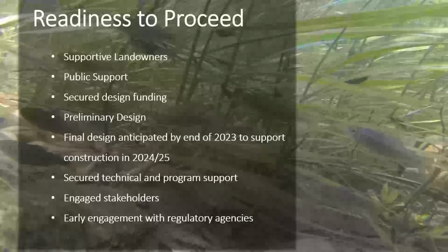And we'll move forward to 60% with concurrence from BPA and RCO. This presentation included a sneak peek looking at the 30% plan overview, which is 100% in line with the concept design that we included in this application. As I mentioned at the beginning of the presentation, I do have Nick here to answer a question specific to Sugar.